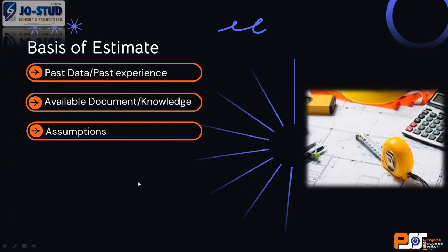If you are doing parametric and analogous estimate, make sure that you state your assumption. If I have time on our next week class, I will show us some proposal I've done in the past, to clients or to organizations who want me to help them manage projects. I always have an assumption page, because the time I am doing you a proposal, I will not spend my money to be given to QS to give me a bottom-up estimate.